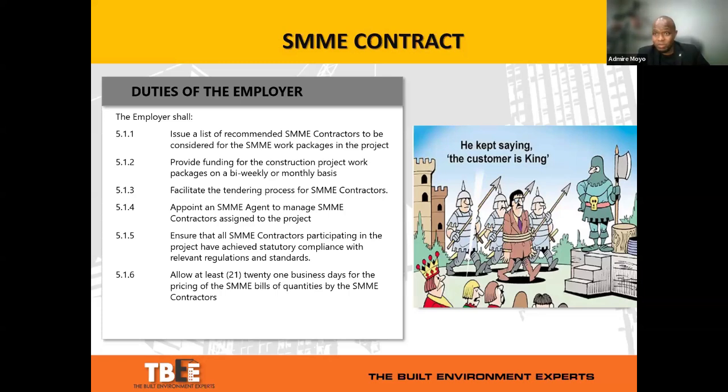So that should be made expressly clear, to say, is our payment regime on a monthly or weekly basis, or bi-weekly basis, or whatever the case is. But that needs to be communicated, because it's often a gray area that leads to site stoppages and issues between contractors and SMMEs, or contractors and the design team.